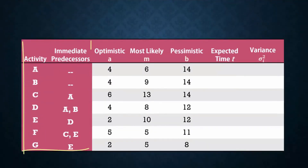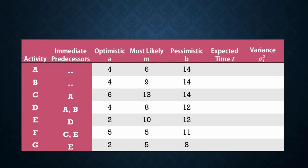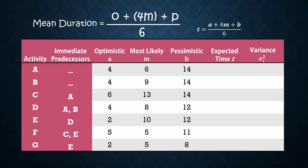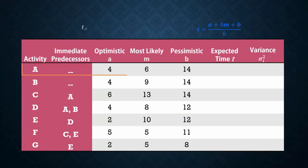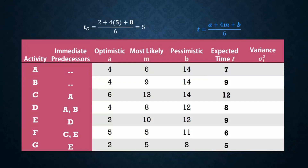Here we have a table showing activity predecessors and their uncertain time estimates. Optimistic, most likely, and pessimistic times are represented by A, M, and B respectively. To calculate the expected time T, we apply the formula T equals A plus 4M plus B over 6. So the expected time for activity A is calculated as 4 plus 4 times 6 plus 14 divided by 6, and that gives 7. We do the same for activities B, C, D, E, F, and G.